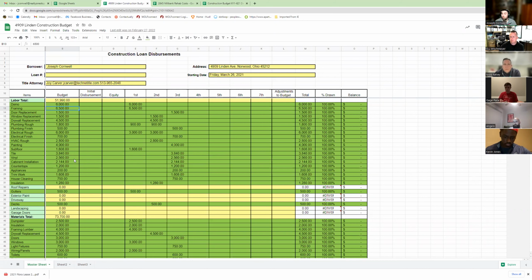Right now, the number I'm working off of is about 400 to 500 for my cost. But if you're a customer, you're probably going to be paying in the 500 to 700 range, which is your cost with the markup. So that's easy to do, right?